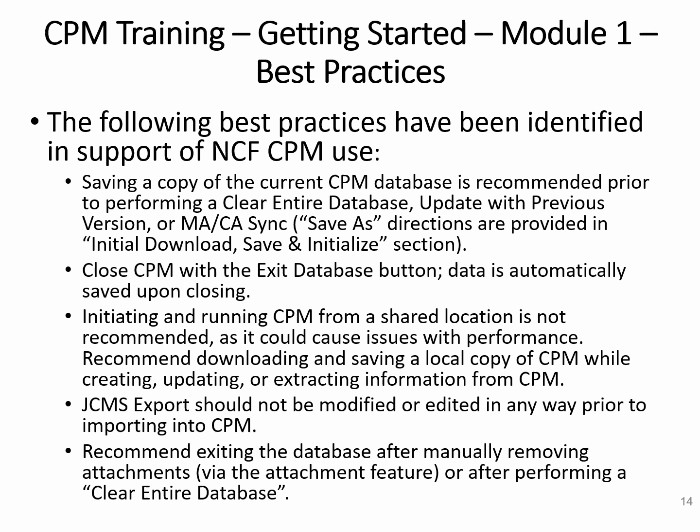Always close CPM with the Exit Database button. If you use anything else, there's no guarantee that it will save upon closing. Initiating and running CPM from a shared location is not recommended. It can corrupt your file, so it's not recommended to open it from SharePoint, a shared drive, a hard drive, or a cloud, but OneDrive is acceptable because that is on your desktop. So you have to put it on your desktop, do your changes, and then re-upload it to wherever it has to go.